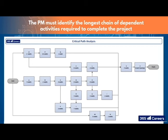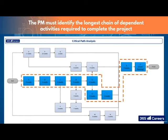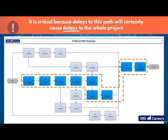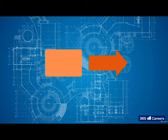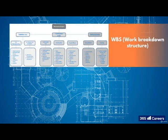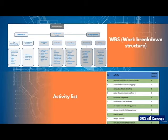What you must do, as a project manager, is identify the longest chain of dependent activities required to complete the project. This is called the critical path. It is critical because delays to this path will certainly cause delays to the whole project. One of the best ways to plot the critical path is to put the information in a network chart with boxes and arrows. This works well because it shows all the tasks and all the durations in the boxes and all dependencies, the arrows, making it as easy as pie to chart a critical path. Okay, using our work breakdown structure and activity list, let's begin.